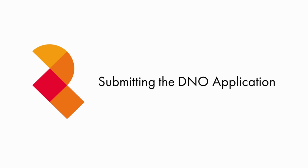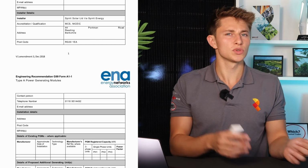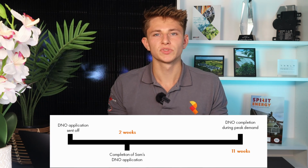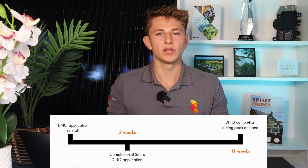The first thing that we always do is to submit the DNO application, which in Sam's case was a G99 application for a solar and battery storage system above 3.68 kilowatts per phase to Scottish and Southern Electricity Networks. After agreeing on a final system design, it's important to get this sent off immediately to your local DNO in order to not delay the installation. DNO applications can take up to 11 weeks to be completed, depending on demand. We were very fortunate that Sam's came back in only a couple of weeks.